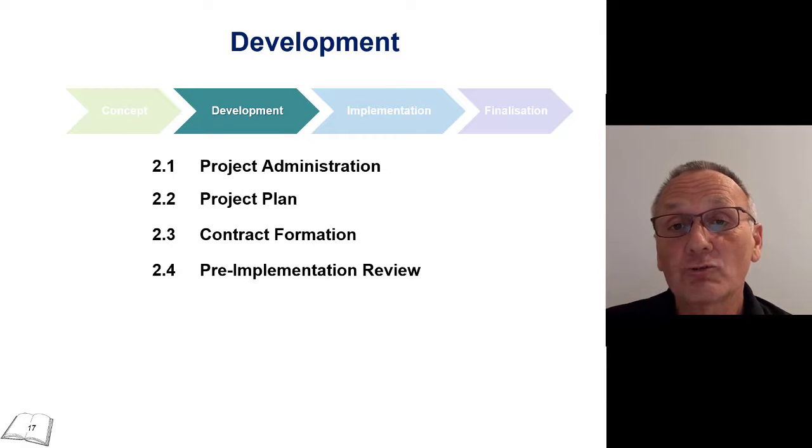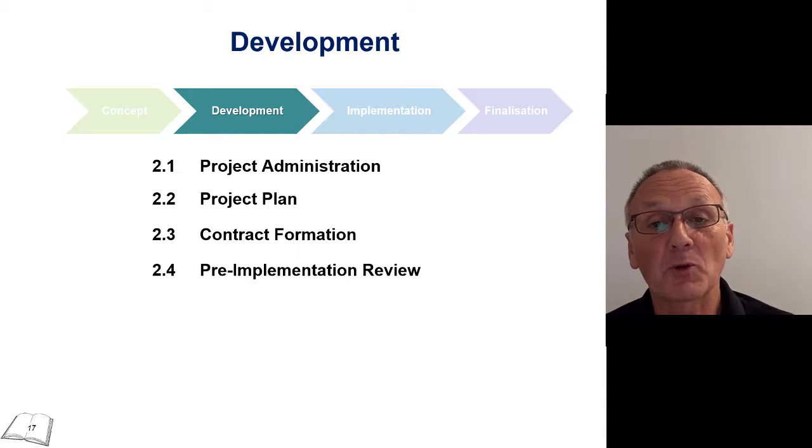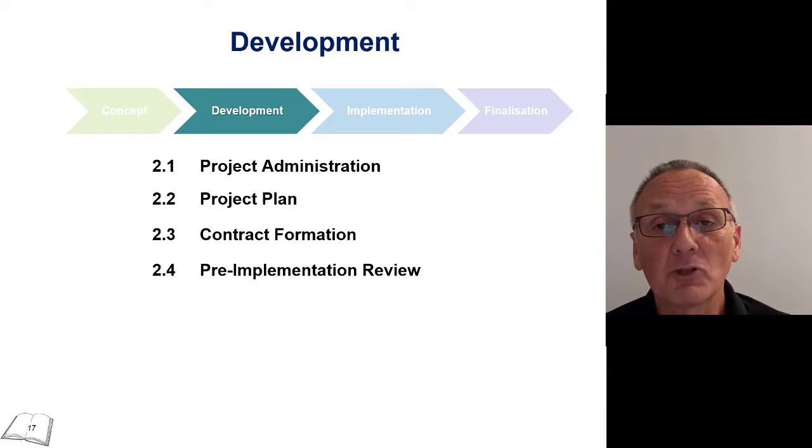So they will revisit the business case at this stage, putting in the new costings, the new timeframes, and a better understanding of what benefits will be achieved, and going through the cost-benefit analysis again. Okay, and if it passes both of those tests, then at the end of the pre-implementation review, the project will move into the implementation phase.